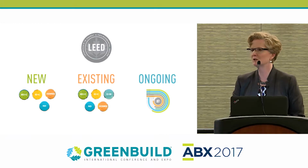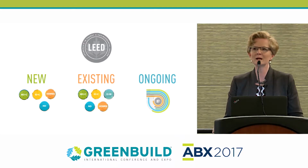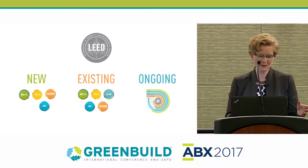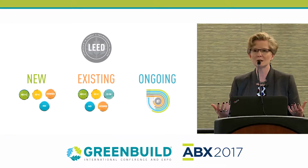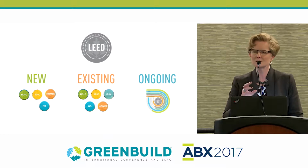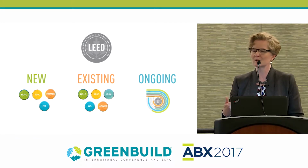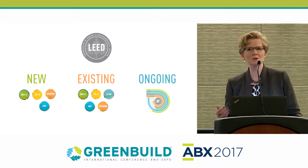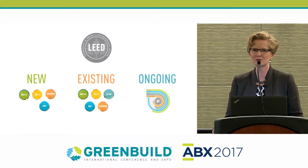So one of the things I think you've heard talked about at Greenbuild for the last year or so is really thinking about not just the initial certification, whether you're a new construction building, a new neighborhood, or an interiors project, or whether you're an existing building that's doing a major retrofit or just a small retrofit, that you're not once and done. That really what's important is that ongoing monitoring of your performance. The rating system requires that you report energy and water data for 5 years after you're certified.